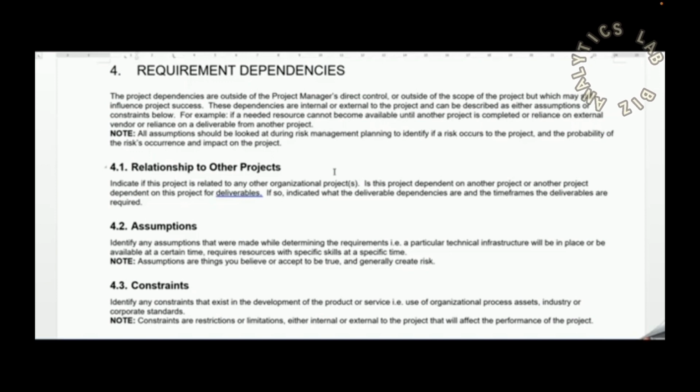So right now there is a lot of uncertainty surrounding COVID, right? That's completely outside this project, but realistically, that factor can really influence the project timeline, right? For example, are we going to get our budget in time because of COVID, right? COVID introduced a whole new checklist that people need to go through in order to get their budget approved. So do you think that could be a constraint, right? Then you would probably write it down. And then, if there's any other existing project going on that could have a dependency on your project, then you should also list it as well.